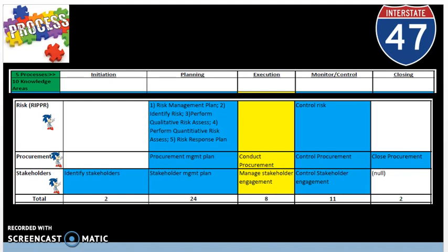We do this for EMV or expected monetary value by multiplying the probability of occurrence with the cost impact, and the cost impact will be positive for opportunities and negative for threats to arrive at an expected monetary value analysis to see which scenario reaps more benefits. The higher EMV dollar amount indicates we should embark on the project, and the lower EMV indicates the project with more downside risk is going to be sidelined or put aside since we'll be losing money.